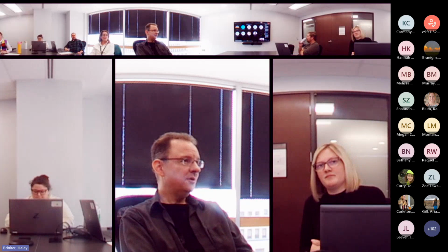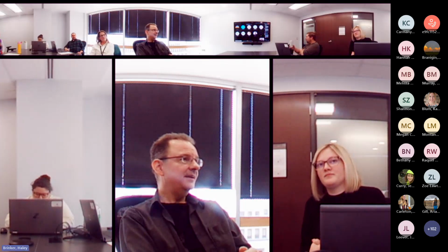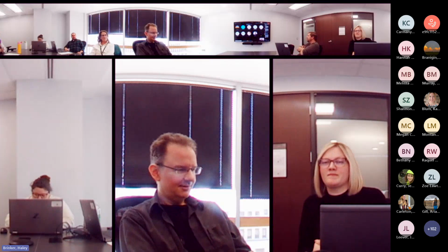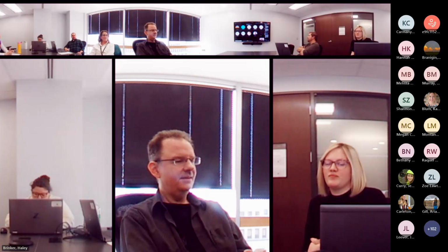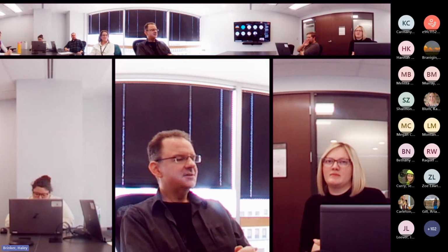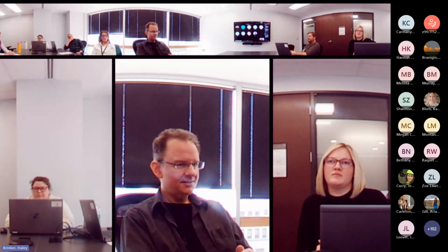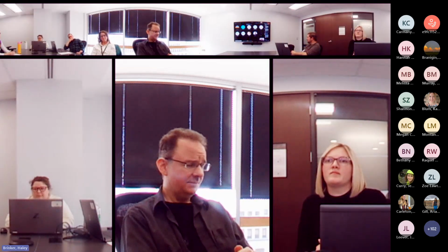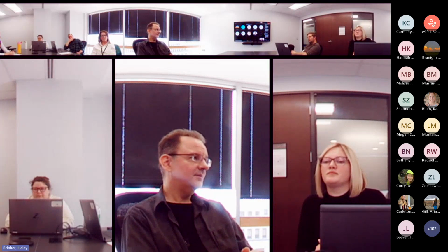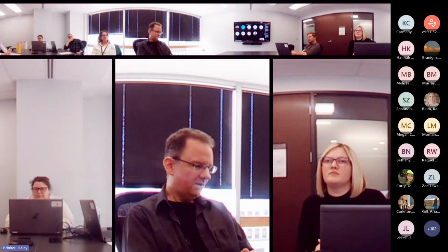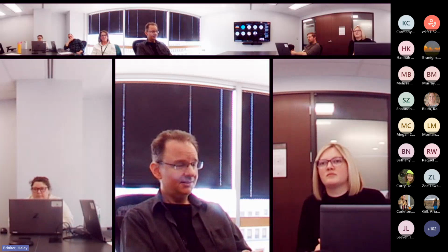And our impression remains, and this is an ongoing issue, as I think everybody well knows, that although Section 106 is typically a critical path in each project's schedule, it may not come to us as early in the process as we would like to see it, to avoid having some particular review taking an extra month in our office for some combination of reasons, and being in danger of impacting the project schedule.